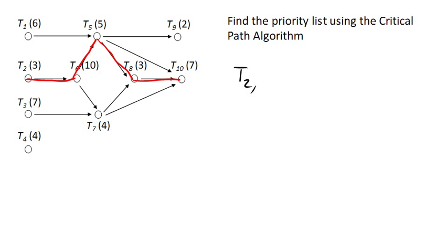So now we're going to imagine what would happen if task 2 wasn't part of the graph at all. So we've already sort of used it up. What's the longest path now? And it turns out this remaining path is still the longest, and so the next task on our list is going to be task 6.